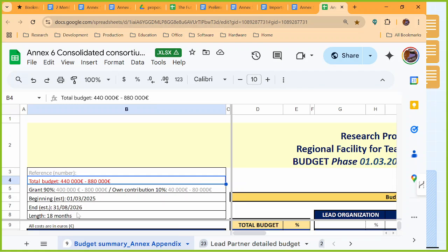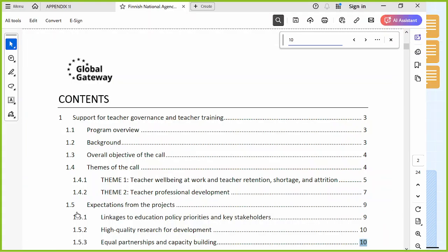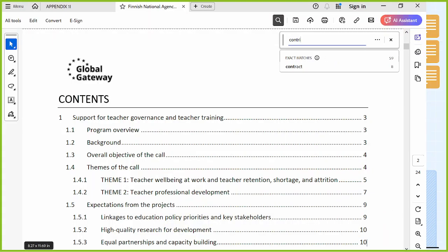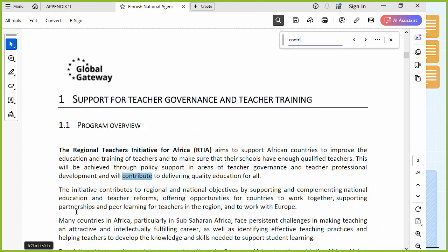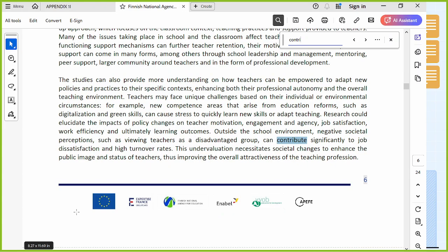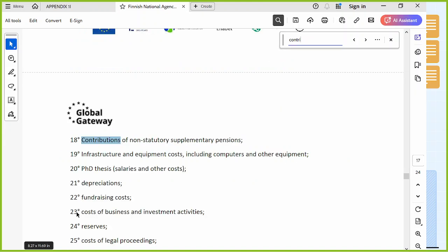So what we will do is, from the calculations, for instance, even if you do the 880, but then we say O'Brien is getting 50,000. The total cost of O'Brien's participation in the project is 50,000, but the amount that we are getting from the award is only 40,000.